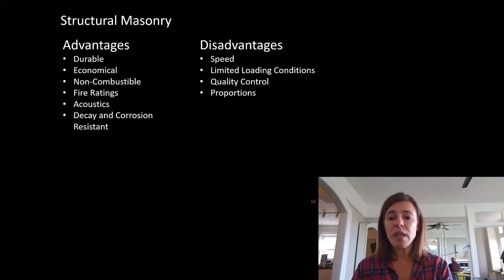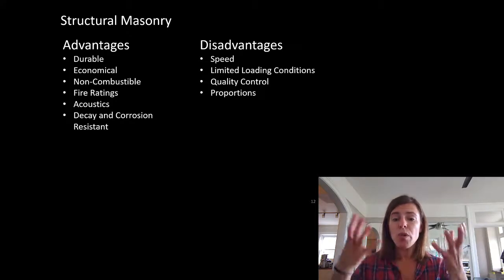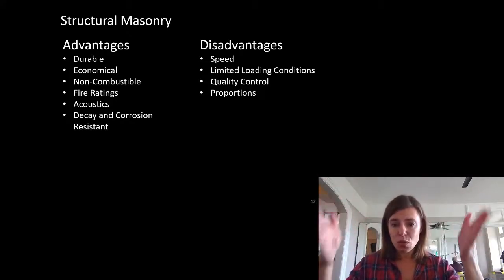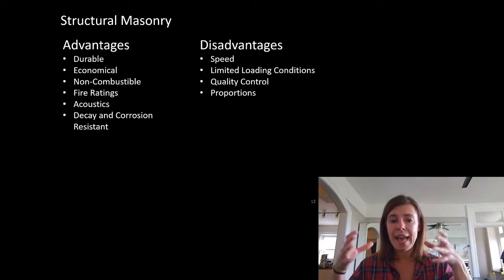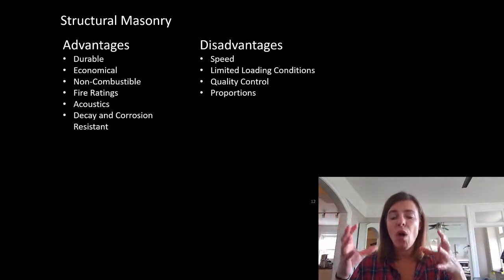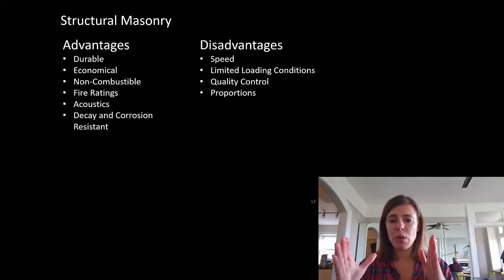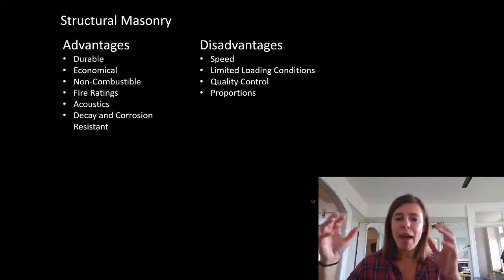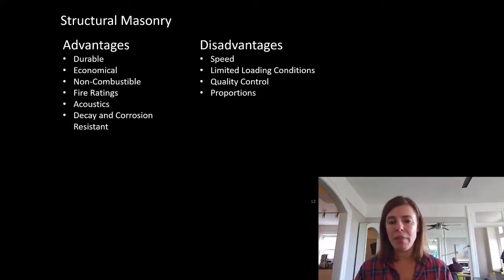So today we do everything we can to take labor out of the problem. So if that means we're using the same basic squared off formwork again and again and again to cut down on the labor of installing that, curving it, making it beautiful, it doesn't matter that there's extra material that we might not need in the analysis, because that is the more economical solution.